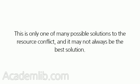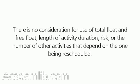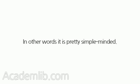This is only one of many possible solutions to the resource conflict, and it may not always be the best solution. There is no consideration for use of total float and free float, length of activity duration, risk, or the number of other activities that depend on the one being rescheduled. In other words, it is pretty simple-minded.